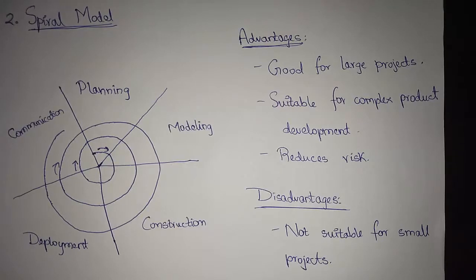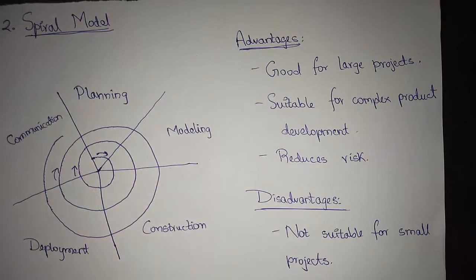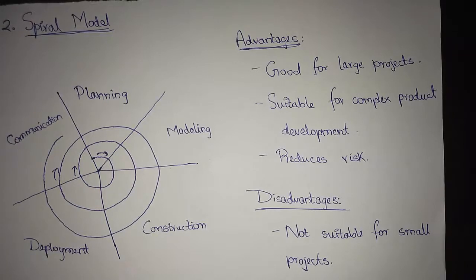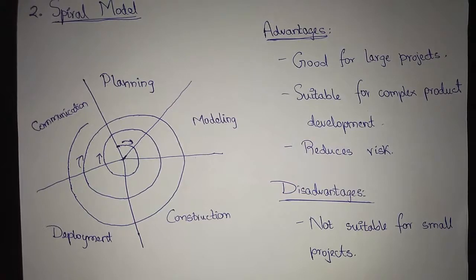The first circuit represents the concept development project and continues through multiple iterations until that stage is completed. If the concept is to be developed into an actual project, a new development project commences — that is, each iteration takes place as a new product. It considers risks at all stages of the product, and if properly applied, should reduce risks before they become problematic. The advantage is that it is suitable for large and critical projects and reduces risks. The main disadvantage is that it is costly in nature and not much suitable for smaller projects.